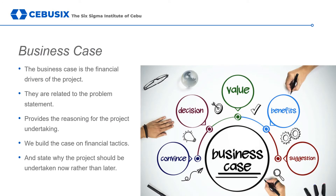The business case might also be referred to as the financial drivers behind a project. Related closely to the problem statement, the business case is a short statement that provides a reason the project should be undertaken. The problem statement tells someone where, when, and how. The business case says why it's important. If you include a business case in your charter, you would build on that basic financial statement to explain why, specifically, the loss of money, efficiency, or quality is important to consumers, employees, or the organization. You might also make an argument for why the problem must be solved now — why is this project being run now in place of another project?